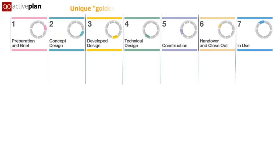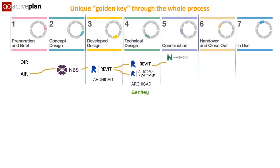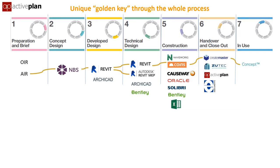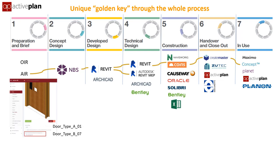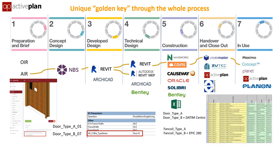The important thing is that we're using the digital information through design, procurement and construction, so it can help generate the digital O&M that can deliver the data required into all of the applications used for operations. The golden key is written into the Revit family so it can automatically connect with real products installed and feed into the asset management systems.